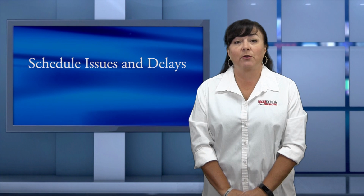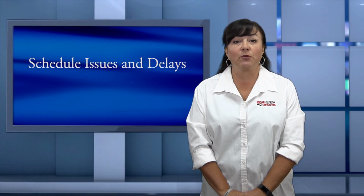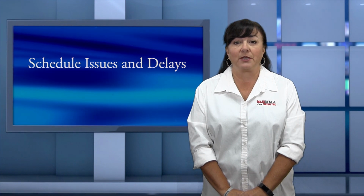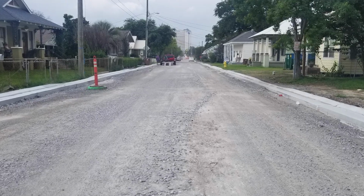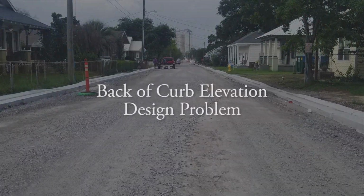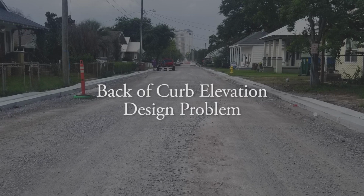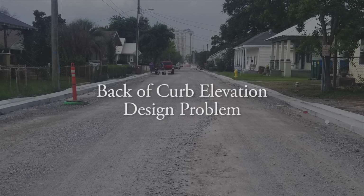And to keep you updated on a few issues, as of today, August the 15th, we continue to wait on direction from the city with regards to Raynor Street, in which we installed the curbing and road base per plans. However, it was determined that there was a design error issue with the back of curb elevations being too high, and we were stopped from laying asphalt on June 13th.